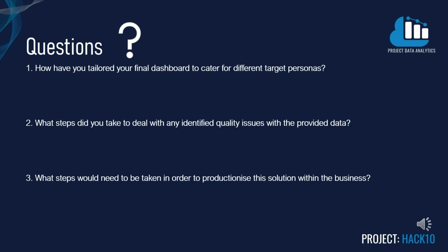The data quality was poor with lots of incomplete and duplicate fields. The steps we took to deal with each issue depended on the trend. For example, when percentage of work complete was blank, we accepted this value and replaced it with 0 so that the necessary measures could be calculated. We decided to do that as we thought it would be better to include this, as it would highlight and provoke the question of why there was no data.